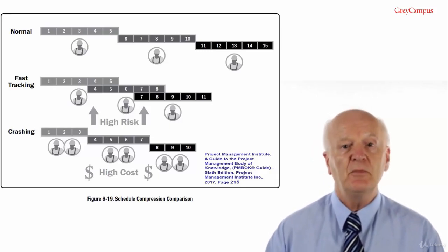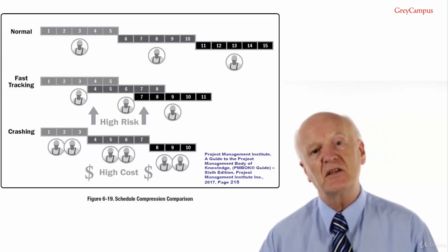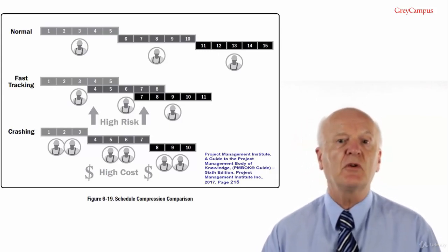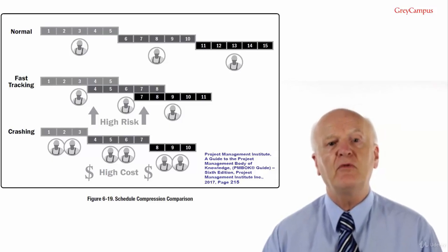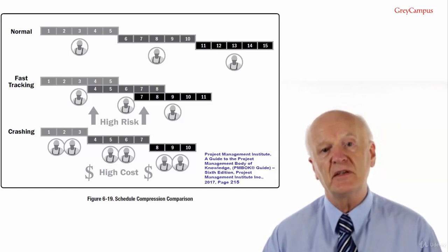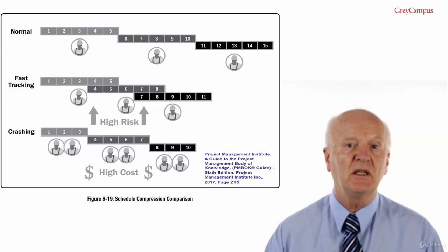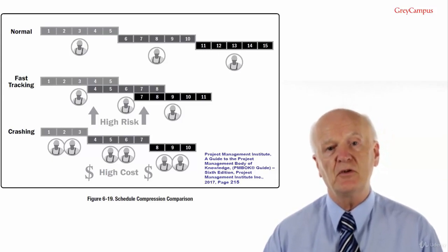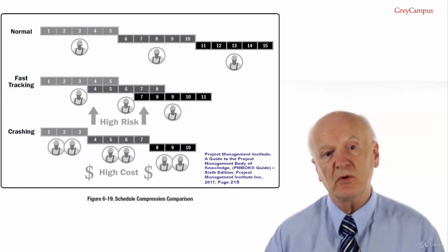Fast tracking. Please note for the exam, fast tracking is a technique used to shorten the schedule duration by performing in parallel activities or phases normally done in sequence. This increases risk by inducing dependencies, which is important for the exam.